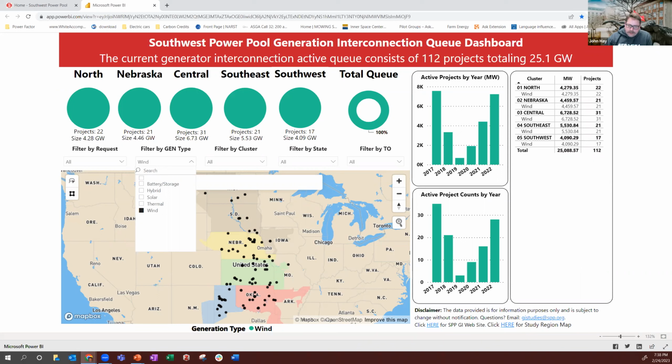I think I'll need more information to try to answer that. I'm struggling a little bit. For a utility scale project, let's say it's solar, because you said solar. The developer, the solar business, is trying to lease land from the landowner. And the requirements for them to be able to use that land or not are within the rules of zoning within that county. If you're close to the city of Lincoln, you have to go to the city. If you're far enough away from Lincoln, you go to the county. And if you're in other parts of the state, you go to the county and work through those zoning rules.